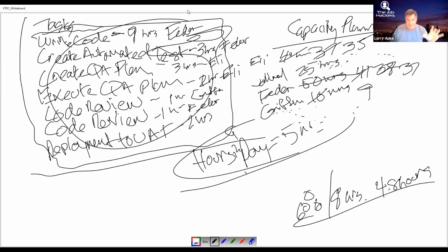Basically breaking down each story. But again, I had to talk about a lot of things before I got there because you got to understand your definition of done and you need to create one regardless of how you plan. But your tasks and hours should reflect to a certain degree the things that you need to do, which is your definition of done. So I got to sneak that in on you, right? Make sense? And then you continue to go story by story until you run out of capacity over here.